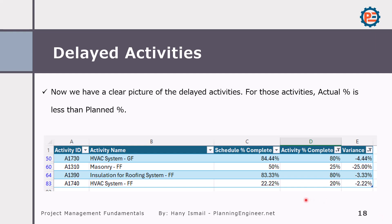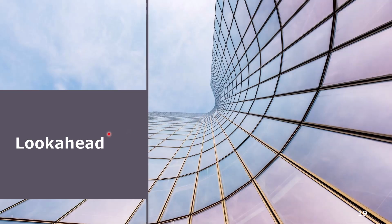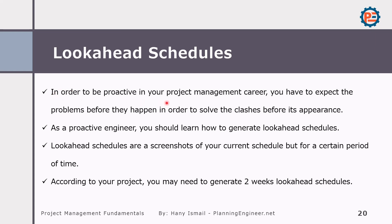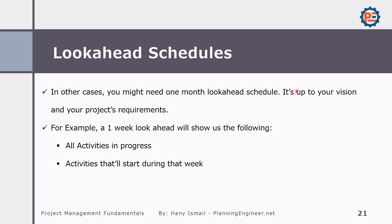The second part of this video, we are going to talk about the look ahead schedule. What is look ahead? In order to be proactive in your project, you need to look at what is going to happen. As a proactive engineer, you should learn how to generate a look ahead schedule. A look ahead schedule is like a snapshot you can take of future activities. You can define how many weeks or days you would like to see — activities in progress, going to start, or going to be finished.